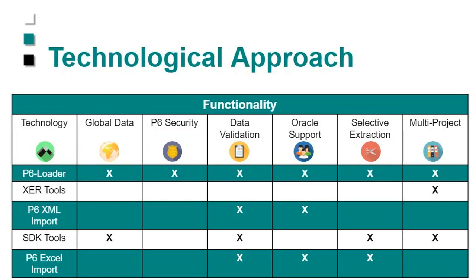The other thing is XCRs don't go after global data anyway. They only include project data. So there's no way for you to actually change things like user profiles or layouts or anything like that using an XCR. The other thing is if you screw up your database with importing a bad XCR, Oracle support is not going to touch it. So be warned that that's potentially a problem.